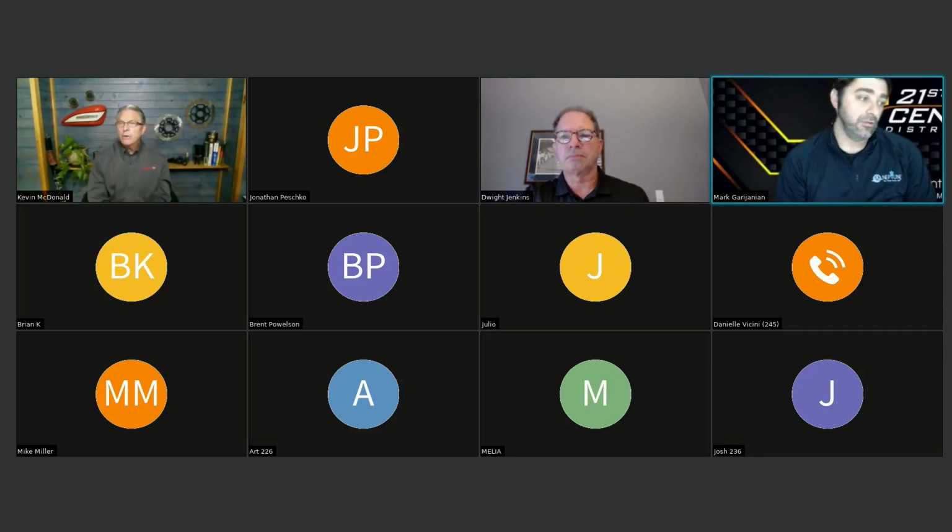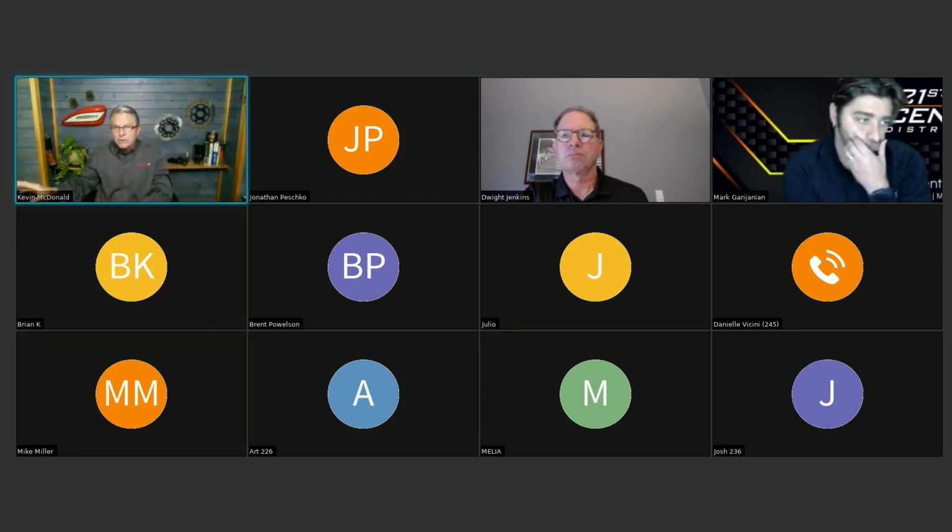I think what they would do is they would most likely come to you and say, hey, I've got somebody interested in a direct view LED wall that's going to be an 8x8, and then you could just find out, okay, what's the manufacturer? You give me the make and model of that cabinet that you're doing, and then you just get a hold of Dwight, and what he would do is build out the quote, and it's going to show the mount. We always put as an option in-wall boxes, so you can hide everything recessed back in there. And then it's going to show the trim kit as an option, and then it's going to show the on-site consultation. We determine how many days are needed based on the configuration.